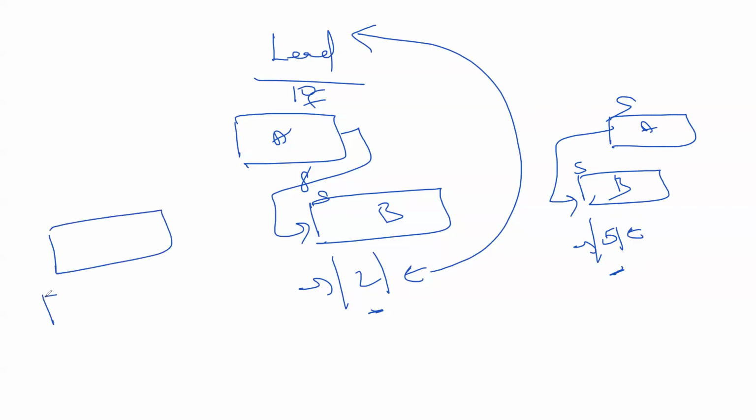Before 2 days of finish of A, I can finish B. So here the relationship is finish to finish, but there is a lead of 2 days. So basically lag will delay the successor activity and lead will accelerate the successor activity.